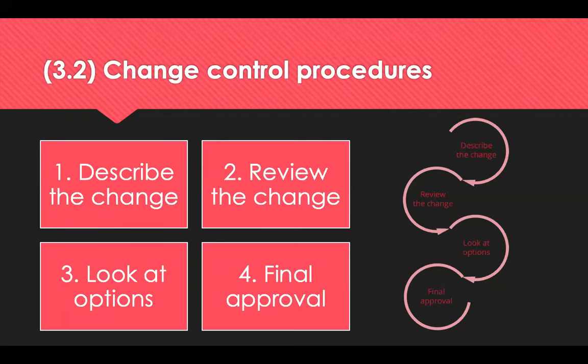Secondly, include the impact it will have on the project timelines and the difference the customer will see. Review and discuss the change with the whole project team to determine if it will be accepted, amended, or rejected. Document any options for the proposed change together with the data that supports the preferred change and the options that were put forward. Then formally approve or reject the change with input from key stakeholders. Any approved changes are then incorporated into a revised specification and updated project plans.